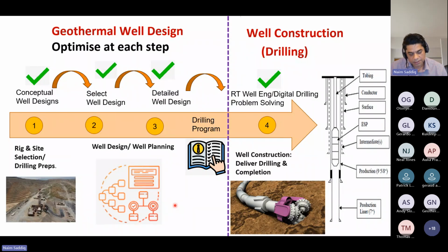You'll be surprised, there are some incidents where people have to stop drilling geothermal wells and ask for a different rig because they cannot drill it anyway. So that's that kind of planning. Spend a lot of time on planning, but not for virtue signaling that I'm doing a good plan. Get the field guys in along with you so that you can work together. Ask them if it is doable, not doable. Is it easy? Is it hard? That way you can have a team that has a grip on the realities. So those things you have to be very careful with.